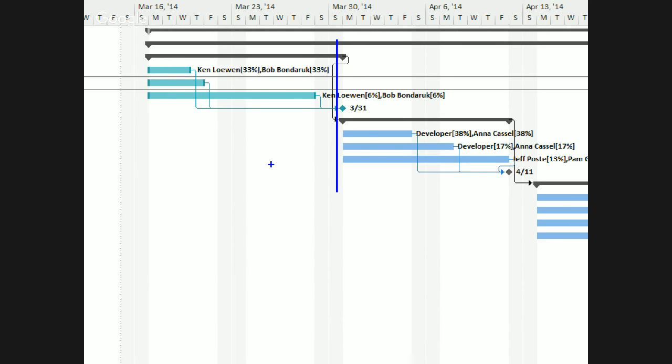Well, in a perfect world, when we're doing project planning and certainly waterfall planning, we do have things that come back and move forward and backwards in time. But sprints are time boxed. That means you have 2 weeks from the beginning here to the end here to get this done. Nothing in here should be moving back to another sprint. The idea is if it doesn't get done, you break it off and you move it down here. So in this case, this is one of the few exceptions I would say: yes, if you want to link your sprints together and ensure that you have a clear time box, activities do not move forward or backwards outside of that 2-week window. And this is a way to make that happen.